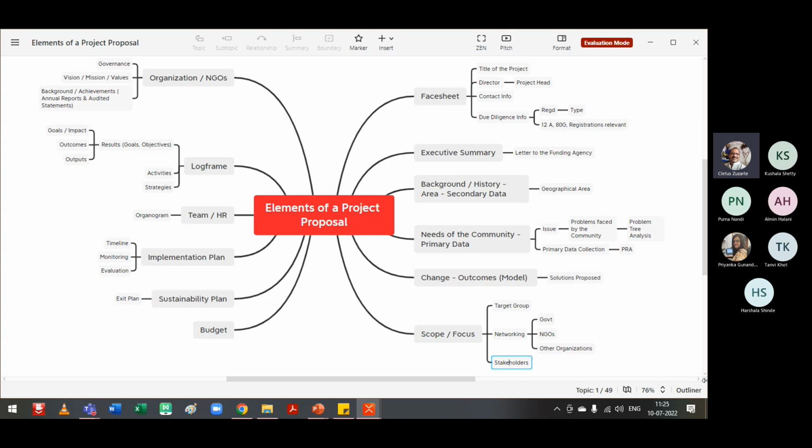Unless you have certain phases where it requires more, like a watershed. A watershed would require phases such as formation of the watershed committees, and then later the actual construction of the structures and the maintaining of the structures. So in a watershed project, it would mean a lot more explanation and a little more clarity on the budget with regard to that.